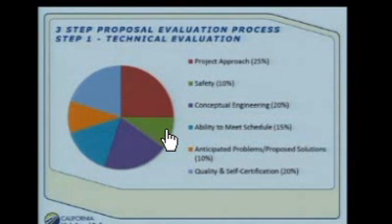When the technical evaluation in a design-build procurement is done, usually there are very broad categories like this. We're going to rate the proposals and take the top 3 out of the 5 to move on to the next part of the competition for selection. If we have only 4 proposals, we again will just go with the top 3.